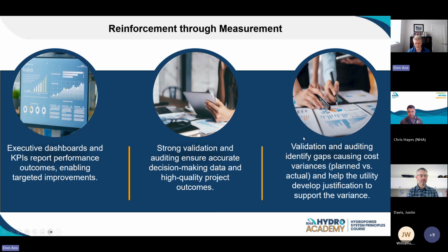So as you get those processes in place, I'll pick on a few. For example, your maintenance program: you said you were going to spend this much on maintenance. Did you actually carry out this maintenance? What were the actual costs? Were there any other failures? Now moving to capital, how many companies actually look at your capital variance from original estimate? Or did you achieve the objectives from your capital investment that you were supposed to? All of these things, bringing them up front towards your management, help move asset management forward.